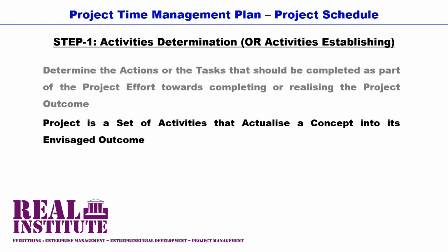The activities of building a house consist of the activities of building the house foundations, which are then succeeded by the activities of building the house walls or the house superstructure that includes electrical activities and plumbing activities, which also are succeeded by the activities of building or installing the house roof, which are also succeeded by the activities of finishes that include painting and other house finishes.